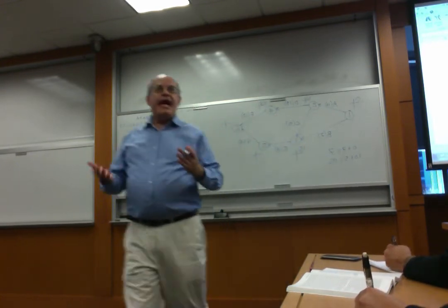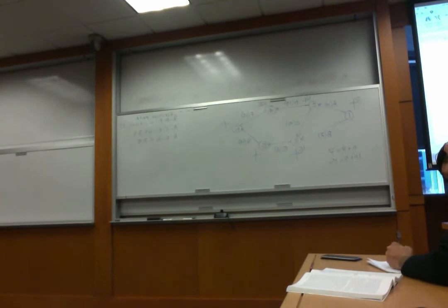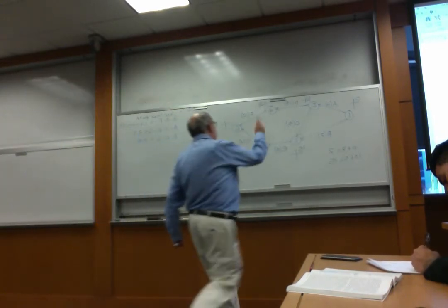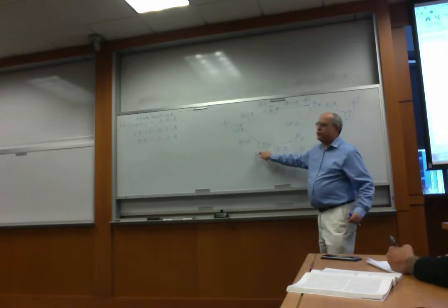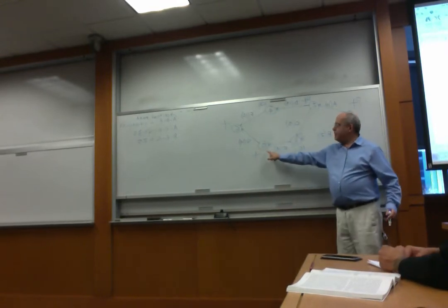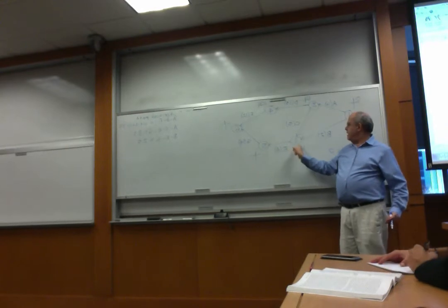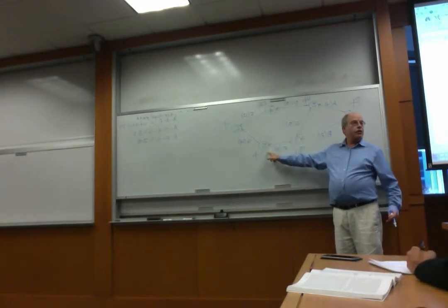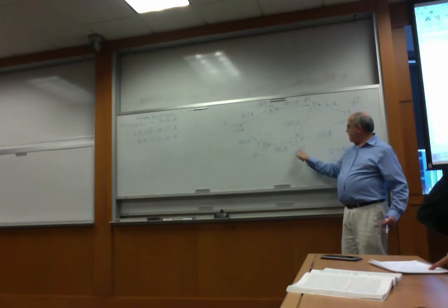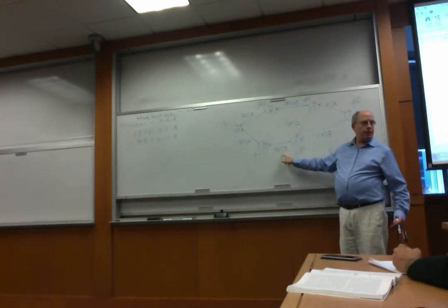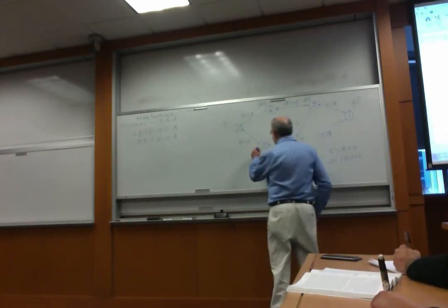Again, we're looking at the graph to figure out if there is a link between the point that we want and any previous point. A link, of course, is just an arrow, an activity. That's the reason for each activity we have the length. So this way we know how to get there. Next, 1, 2, 3, 4, 5. The next one is 5. Is there a link between 5 and a previous point? Yes, 3 to 5. So how long is it going to take us to get there? The value at 3 is 15, plus 4, 19.